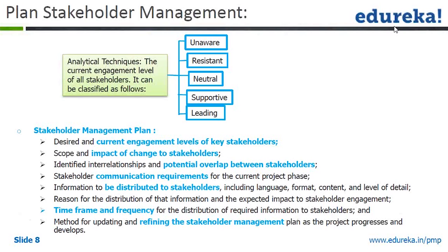The stakeholder management plan will include the desired and current engagement levels of stakeholders, scope and impact of change to stakeholders, identified relationships and interrelationships, potential overlaps between stakeholders, communication requirements, information to be distributed, and the time frame and frequency for refining the stakeholder management.